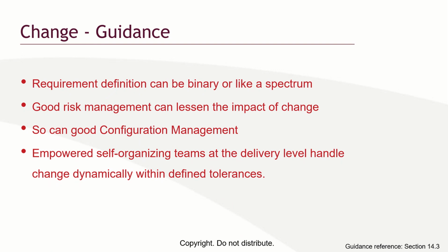One, your requirements should be defined. You need to do a good risk management to limit the impact of change. You need to have a good configuration management. What is the configuration management? You need to have a place where you keep record of all the different components that are used, all the items, component being used.